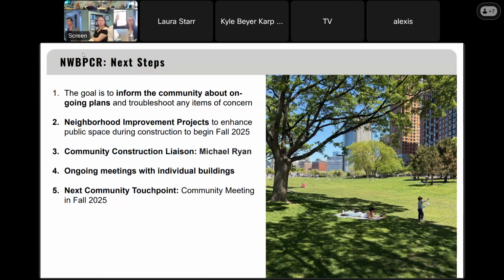So, hang on a second, let's move around here a little. So Richard, there are test drillings on Harrison Street. Could you share with us what you've learned from that? So I can't speak specifically to that test pile, I think is what you're referring to. I know that we've done a number of test pits, and the goal there is to see what's underneath in terms of utilities. As I mentioned on the South project, we didn't know what was going on underneath Battery Place, and so when we discovered this spaghetti of Con Ed wires, it held up construction a great deal. So our goal is to do test pits here and there to figure out what we need to avoid, what we need to accommodate. So that was part of that effort.